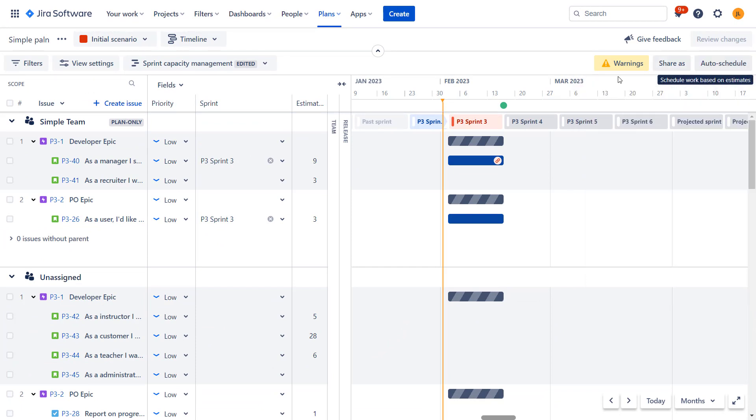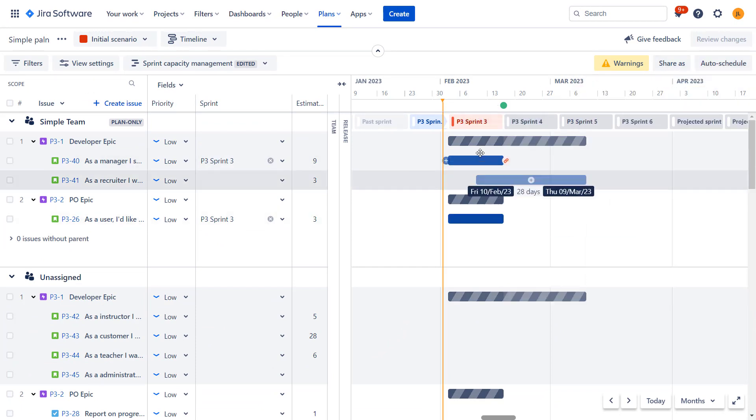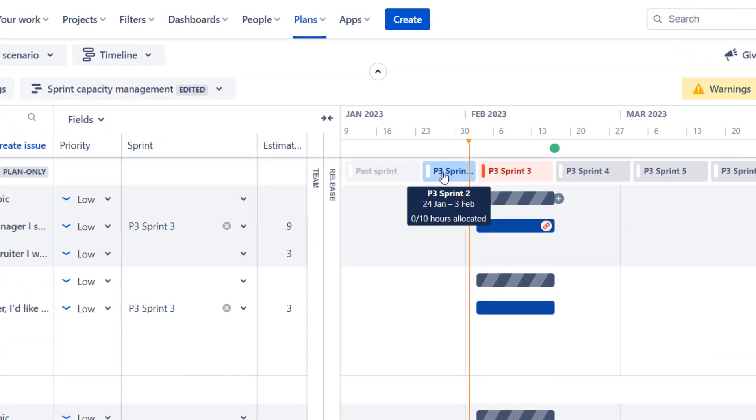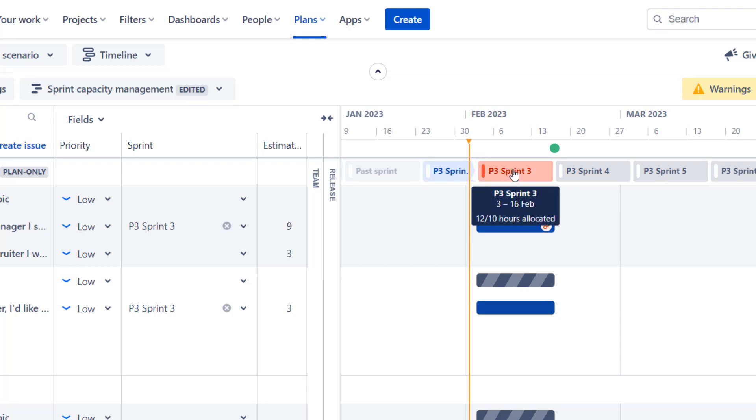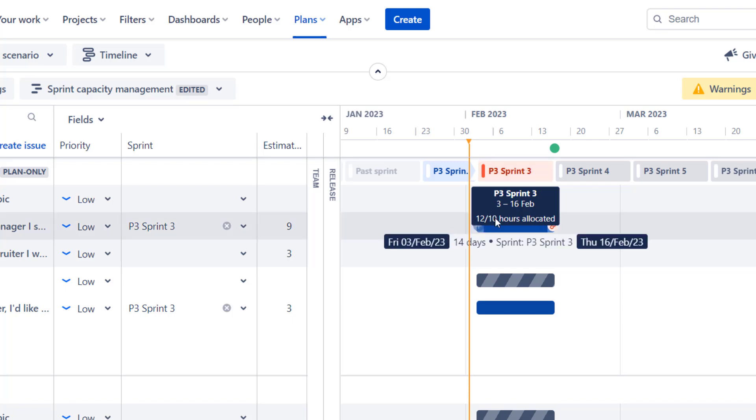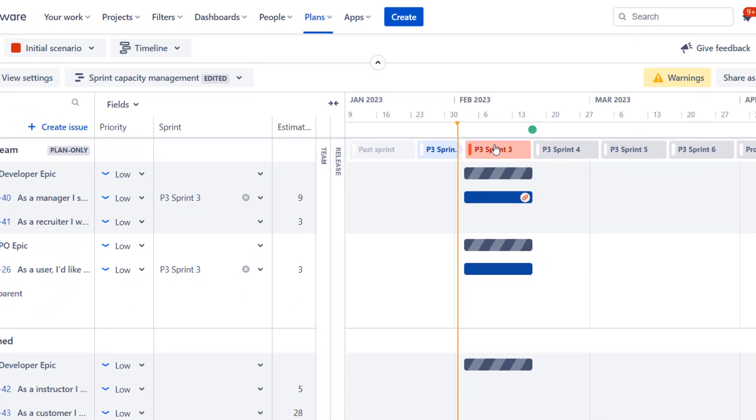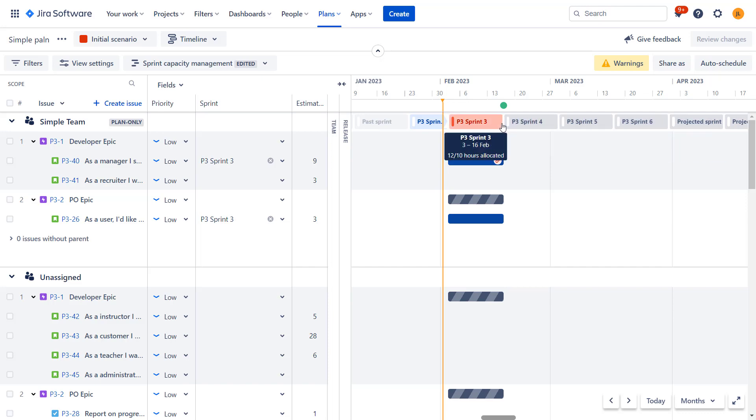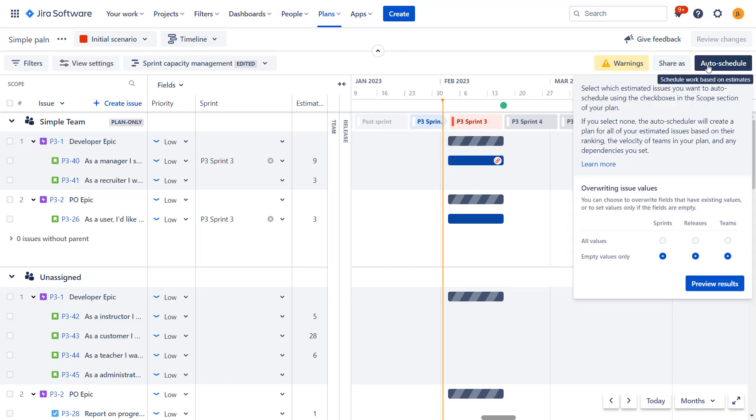I won't click that yet. Let's look at our current setup. So we will focus on simple team. We can see that in active sprint, there is actually no work assigned yet. In sprint three, we actually are over allocated. So I have 12 hours out of 10 hours of capacity allocated. So we're in red over here and in the future, there's nothing more. So when I'll do the auto schedule, I have empty values only. Let's see the outcome.